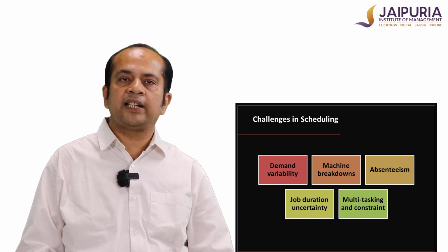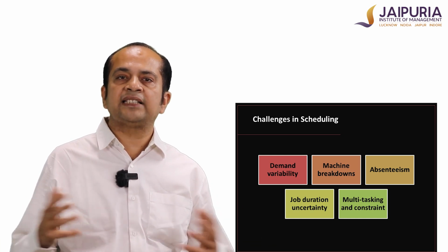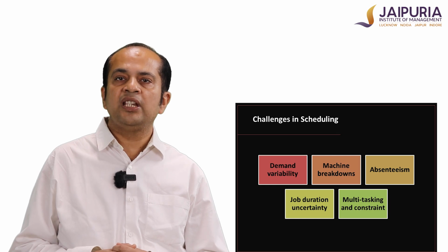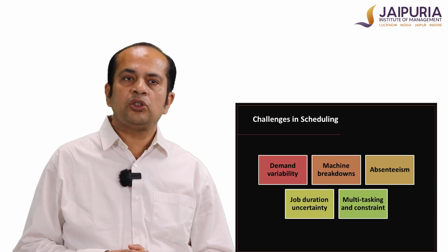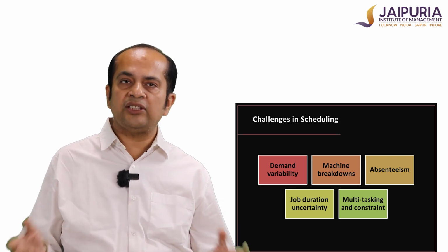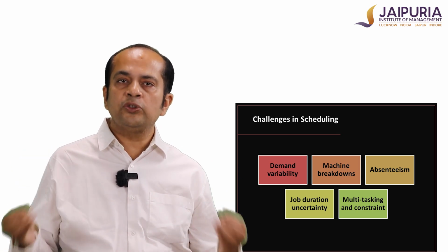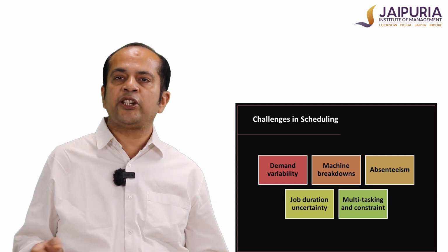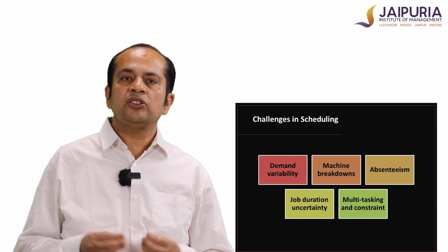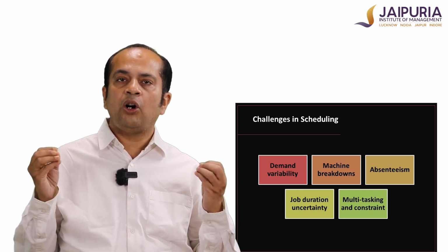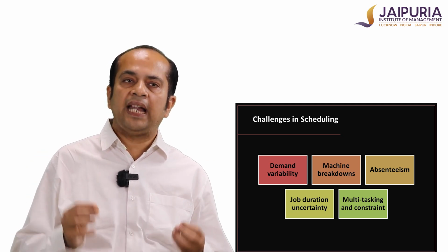Job duration uncertainty may arise as sometimes actual processing times may take longer or shorter than planned. To deal with uncertainty in task durations, schedulers use buffer times, simulation tools, and sometimes adopt stochastic scheduling models. Learning from historic data also helps to refine time estimates.